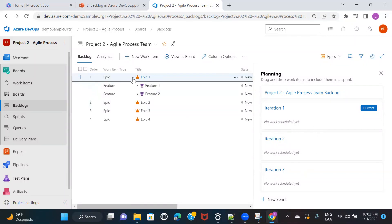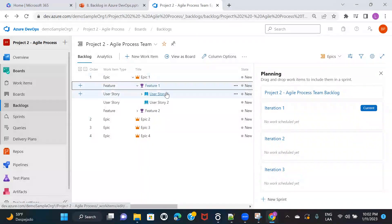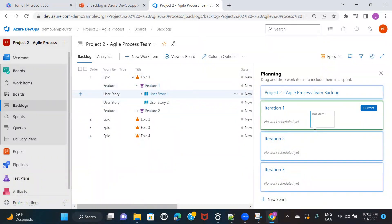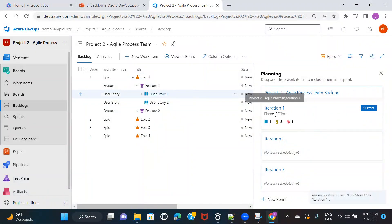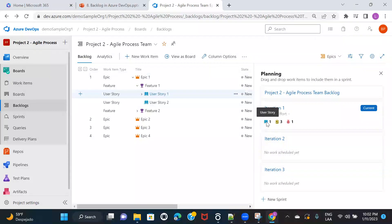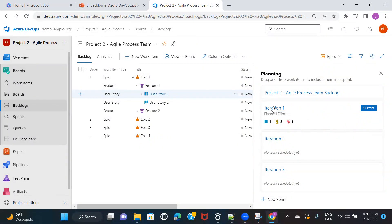For example, I'll drag User Story 1 from Feature 1 of Epic 1 and drop it to Iteration 1. The moment I drop it, you can see it shows one user story assigned, with three tasks and one defect. It also shows this is your current sprint. If you want to assign user stories from Feature 2 to Sprint 2 instead, just drag and drop them there — based on priority and criticality, you decide the best sequence for building features.